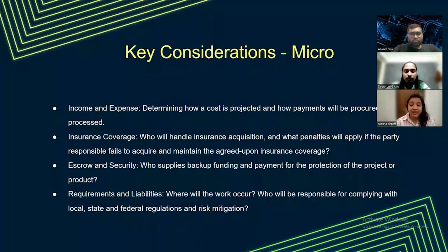It is a part where they put it in the SOW, because there are times when, say, I have decided to give out 20,000 per month for a particular project. If within this timeline they cover this portion of work, but they have additional expenses, they're incurring additional cost on it, where do they take that out from? The company who's doing it for me has additional cost and expenses. So they put it under the payment clause, where they say this additional expense will be added to the payment, and they will raise an invoice, and on the basis of that, the company will pay it. So this is how this clause is covered.